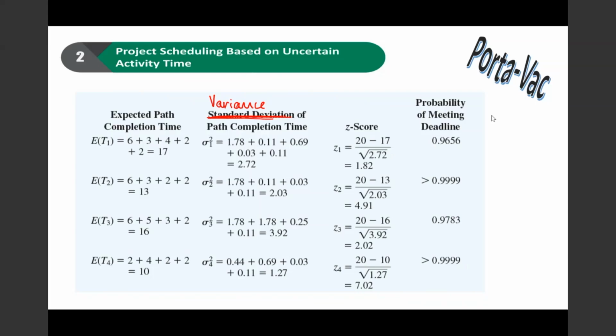Importantly, the project manager has to frequently monitor the progress of the project. Especially, the higher the variance is, the more attention the project manager should pay to those projects, because there is a potential likelihood that these projects could go haywire because the variance is big.